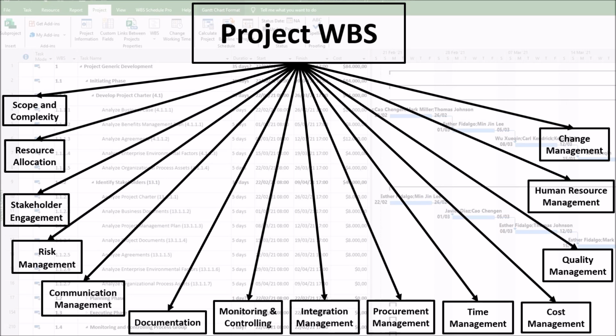14. Change management. Considering a small project, change management is simpler, with fewer changes and a more flexible approach. Now, considering a large project, a formal change management process is essential, with a change control board, detailed change requests, and impact analysis.